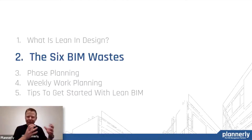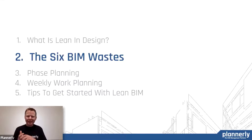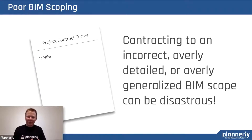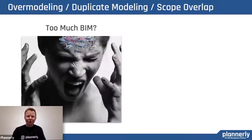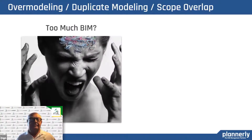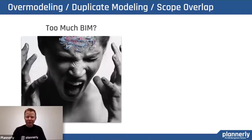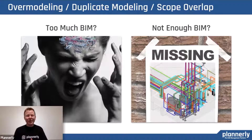What we need to do is figure out what in our BIM management is wasteful and begin to stop doing that and start doing more valuable things. We've got six BIM wastes to introduce. The first is poor scoping — how do you run a workflow contracted for an incorrect, overly detailed, or overly generalized scope? It can be completely disastrous. The second is over and under production — too much modeling at the wrong time can be really painful because it creates wasteful rework, and if the customer doesn't get what they need, they can't do their work.